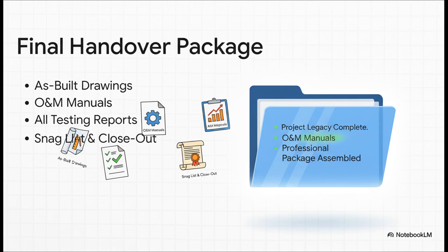This isn't just a pile of papers. It's the complete instruction manual for your work. You're providing the as-built drawings that show exactly how it was installed, the maintenance manuals, all the test reports, the warranties, everything they need to operate and maintain the system you just built. This is your legacy on the project.